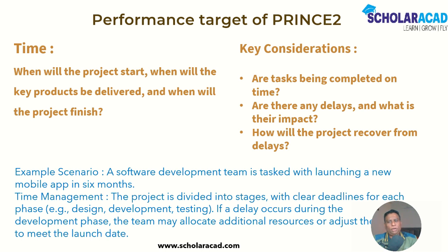For example, in software development, you require to develop applications within 6 months. So you require to divide the whole project into various stages, like requirement gathering, designing, development, testing, or UAT. You would require to break down the whole project into many phases depending on the project management activities. You would like to define the timelines according to your project, available resources, and key considerations of risk and uncertainty.